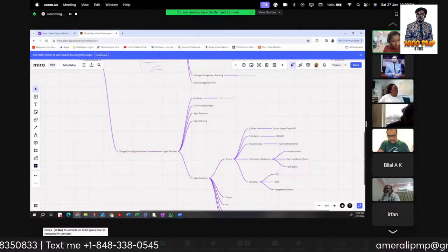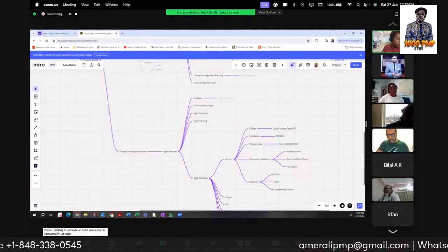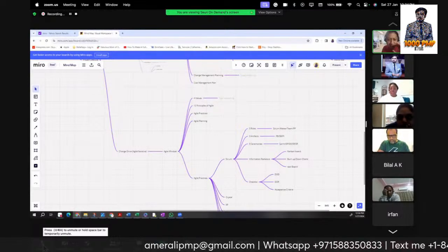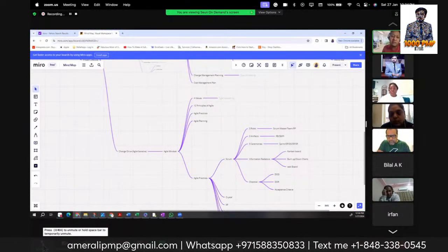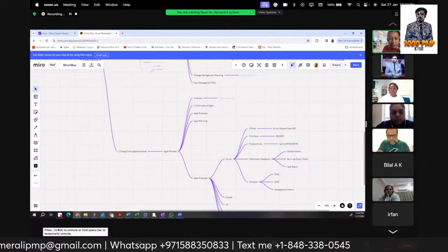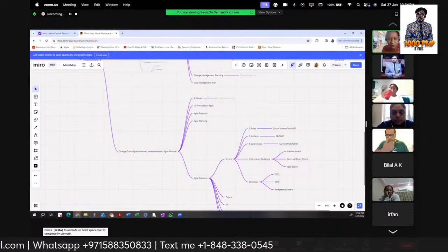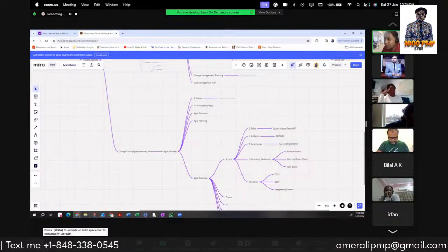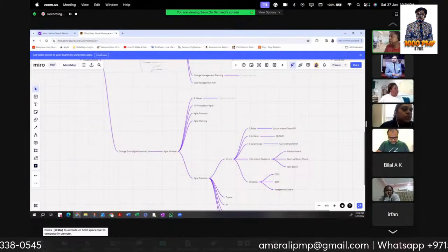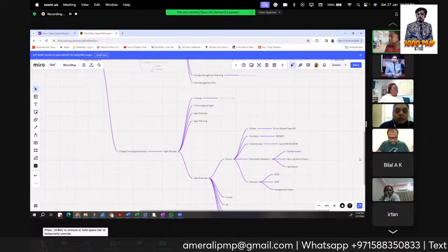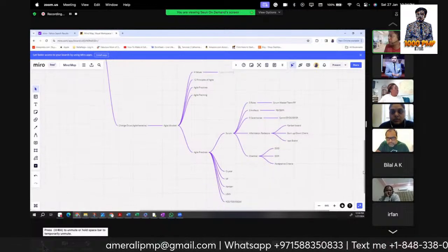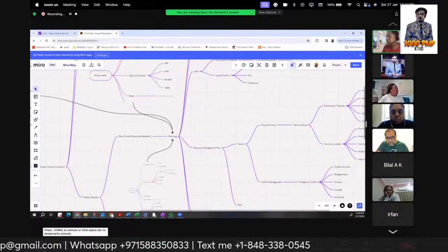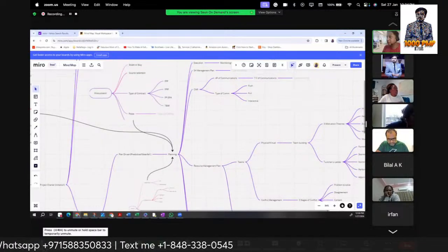So whenever you have a number of deliveries or more, and the scope also keeps on changing, we'll go with agile. So agile generally starts with, it's a mindset actually. So when you say mindset, there are 4 values, then 12 principles, and there are a couple of agile practices, and also planning. So maybe if you could zoom in a little. So in the planning, there are multiple types of planning. One goes with a higher level, which is vision to the roadmap, then release level, then iteration level, and then daily scrum level.